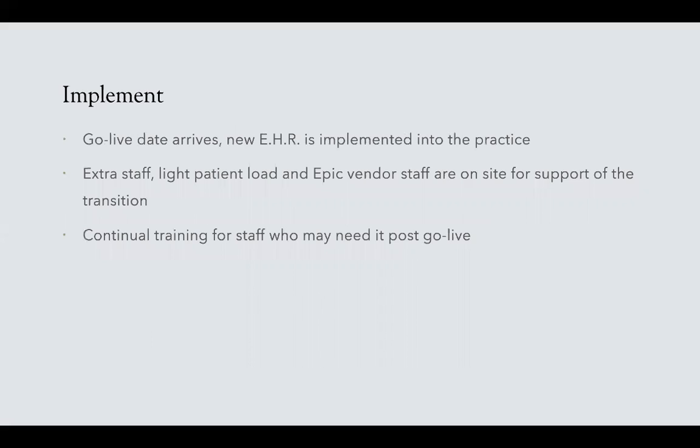Next is the implementation phase. The go live date arrives and the new EHR is implemented into the practice. On this day, the head cardiologist ensures that there's extra staff, a light patient load, and the Epic vendor staff are on site for support of the transition. Within the implementation phase, you want to make sure there is continual training for staff who may need it post go live to ensure that their workflows are happening correctly.